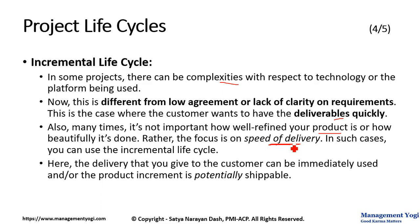Here, the delivery that you give to the customer can be immediately used, and the product increment is potentially shippable. Simply speaking, Iterative Life Cycle is about continuous refinement of requirements — when you have low agreement with respect to the requirements. On the other hand, Incremental Life Cycle is about speed of delivery — how fast you can deliver to the customer. You can also say Iterative Life Cycle is about the correctness of solution, while Incremental Life Cycle is about the fastness of solution — how fast you are delivering, because you have to deliver quickly.